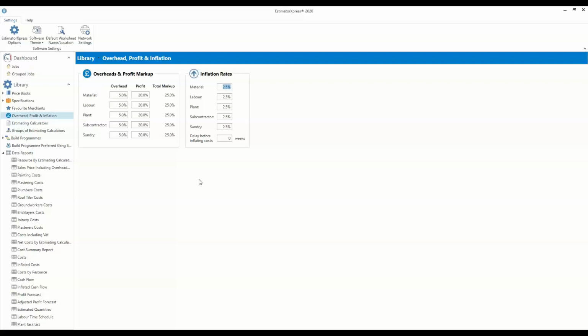So you can get that stuck onto the quote when you present it. We can put in 2.5%, 3%. Don't delay the inflation kick-in. So the client's actually got a price that allows for any future inflation on materials and labour. It just protects your profit, so any future increases aren't eaten into here. And again, you can say to the client that it's a future-proof estimate up to the point when they actually want the job to start. Nothing's going to change. So again, give yourself a bit of an edge over what other competitors aren't doing.